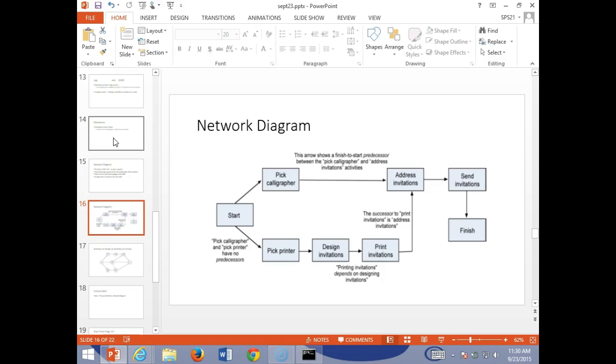But what's crazy then is if I add up all the time. So if we said each one of these activities was a day, we'd have 1 day, 2 days, 3 days, 4 days, 5 days. That critical pathway, the longest path through our multiple pathways, is the minimum time for the entire project. So it's kind of a weird thing. We look at the maximum to get the minimum. And I know that seems a little crazy until we work through some of it.